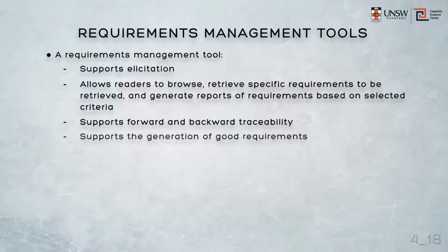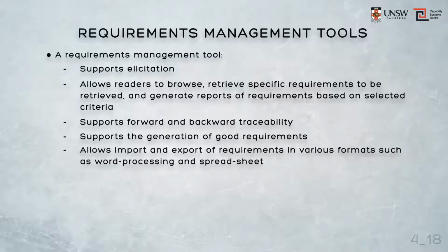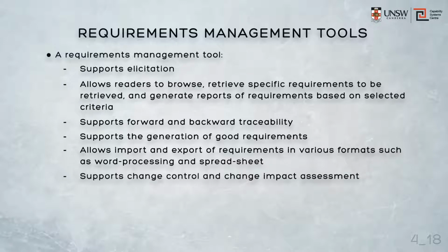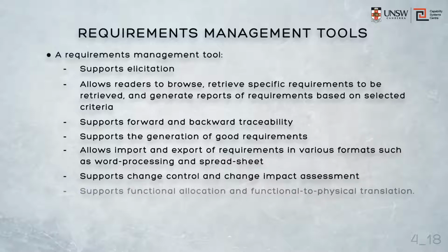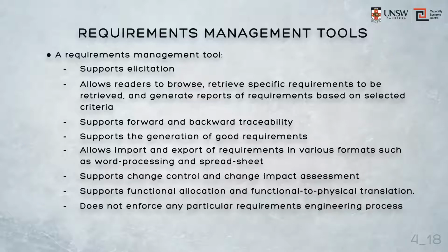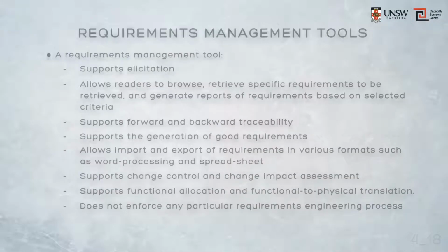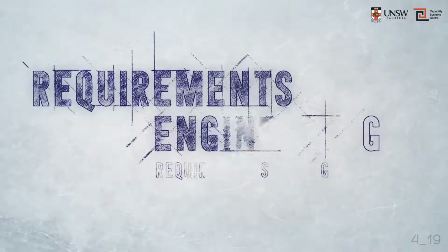Requirements engineers need the support of the tool to generate good requirements, with appropriate spelling, punctuation, and use of glossary terms and template structures. Requirement sets also need to be delivered in a variety of formats, so it's important that the tool allows import and export of requirements in various formats such as word processing and spreadsheet format. The tool should also support change control and change impact assessment, as well as the functional allocation and functional to physical translation. And finally, it's important the tool doesn't enforce any particular requirements engineering process. So that's a brief overview of requirements management tools.